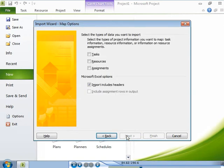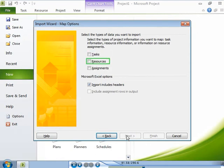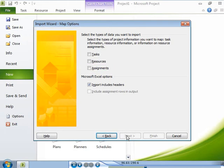The next step is to specify the types of project information you want to import. You can import information about tasks, resources, and assignments. In this case, the Microsoft Excel workbook contains only a list of tasks, so select the tasks checkbox.